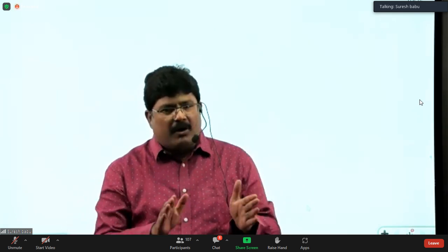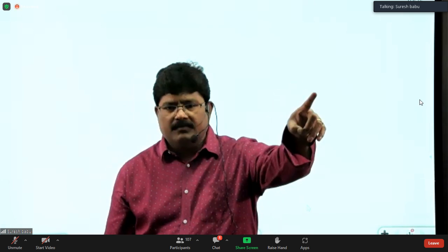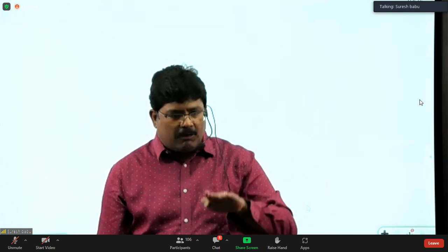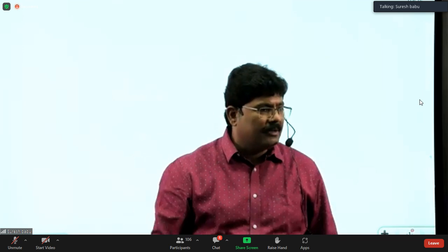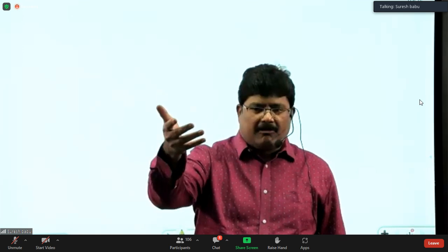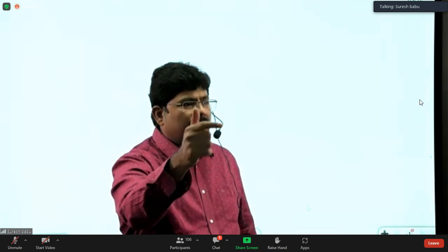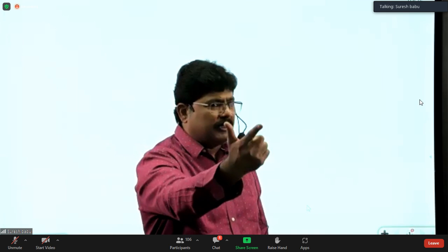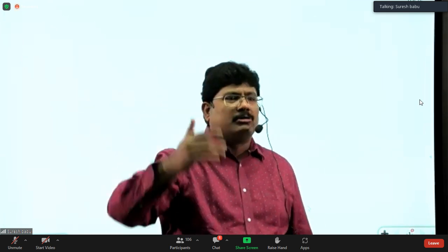1 week, we focus on developing 4 features. I'll demonstrate to my client and get the comments or suggestions from my client. My client says, okay, keep it aside. Next week, plan the next 2-3 requirements. After developing the 2-3 requirements, add them to the existing system. Again, demonstrate to the client. Based on the client's comments or suggestions, if needed, you modify. Again, demonstrate to the client. Get it approved. Keep it aside. Next week, plan the next 2-3 requirements.